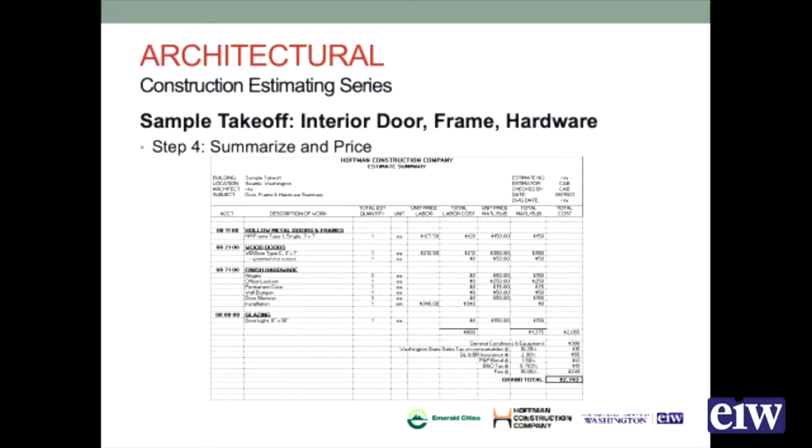Looking at the finish hardware, I've got all the different pieces of the hardware group, just material pricing, and then I've included 1 set here of this hardware group, and included some installation dollars to install the whole group of hardware. Then because I'm looking at this more globally and making sure that I include everything, I've included that door light. It's a 6 inch by 30 inch door light.